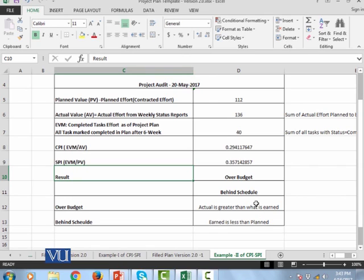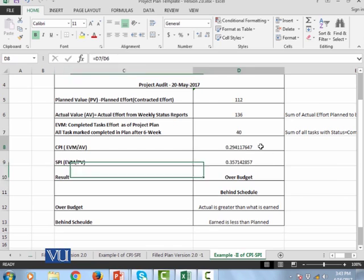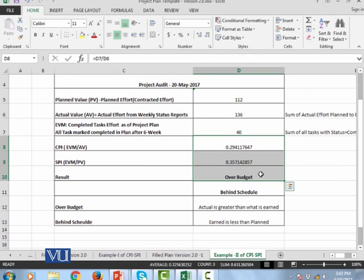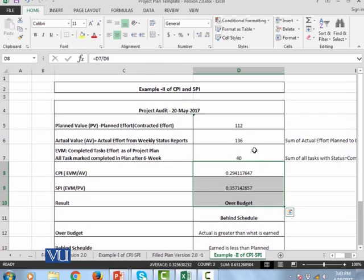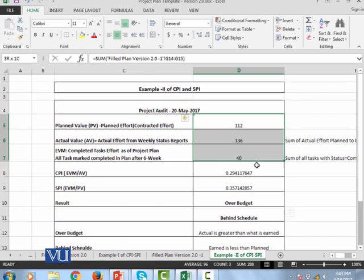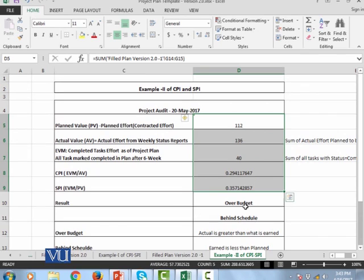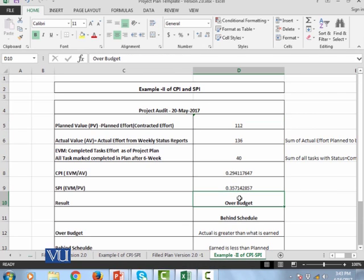This stat is actually telling me that now we need to take the corrective action, not on my gut feeling, not on my mere gut feeling. Now I have the data. Now this data is telling me that the project is not in the correct health. Its health is not good because SPI and CPI, both indicators are showing me actually the negative value.